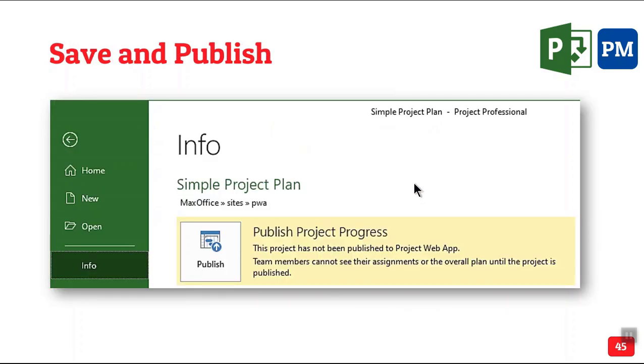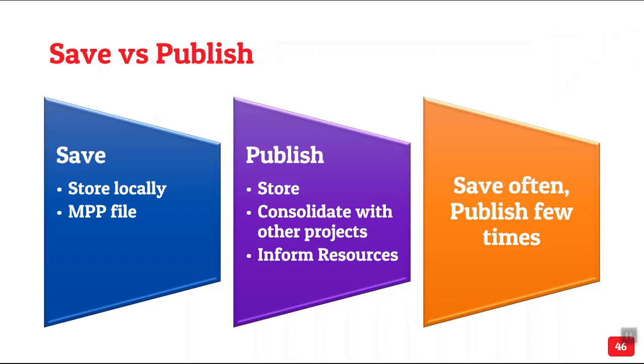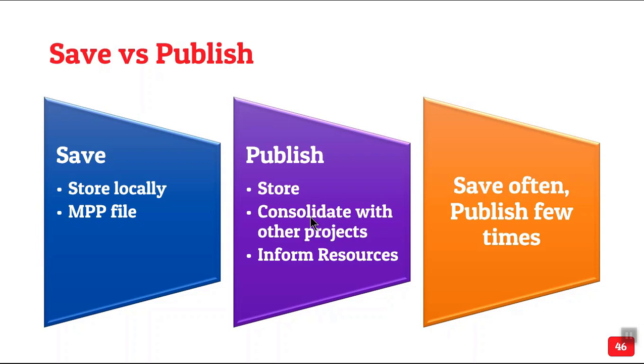Now, it's not just saving the project. We already saved it. Now that we have finalized who is going to do what, we publish it. There's a difference between saving and publishing. Earlier we used to save our MPP file locally. Nothing happened. It's entirely up to you to copy paste from it. When you save and publish, it gets stored on the server. It gets automatically integrated with other projects and all the resources get automatic email saying you are supposed to do this for this project on this day 12 in advance. You are not copy pasting. You are not sending a mail to all the resources ever.